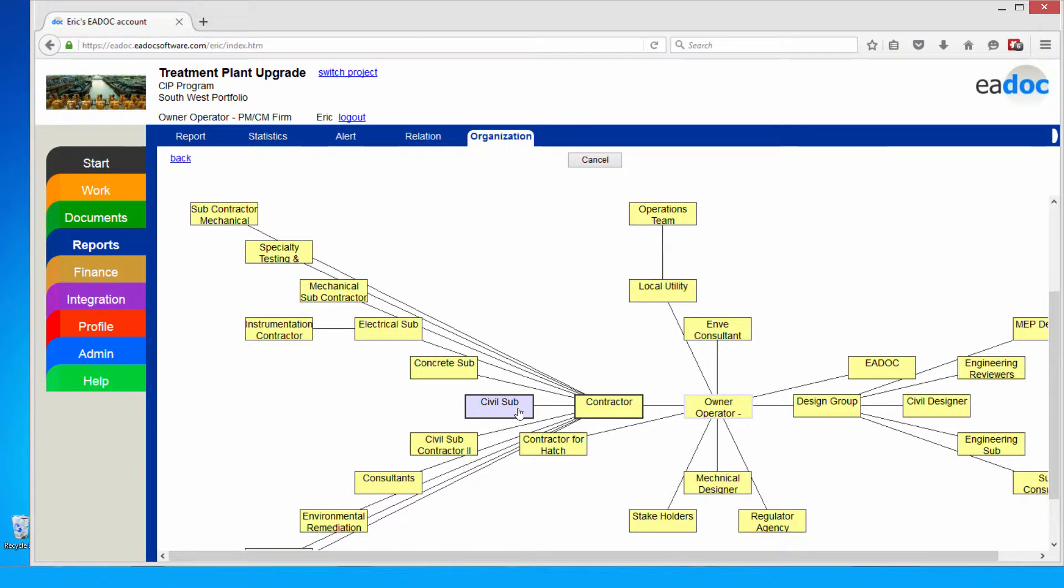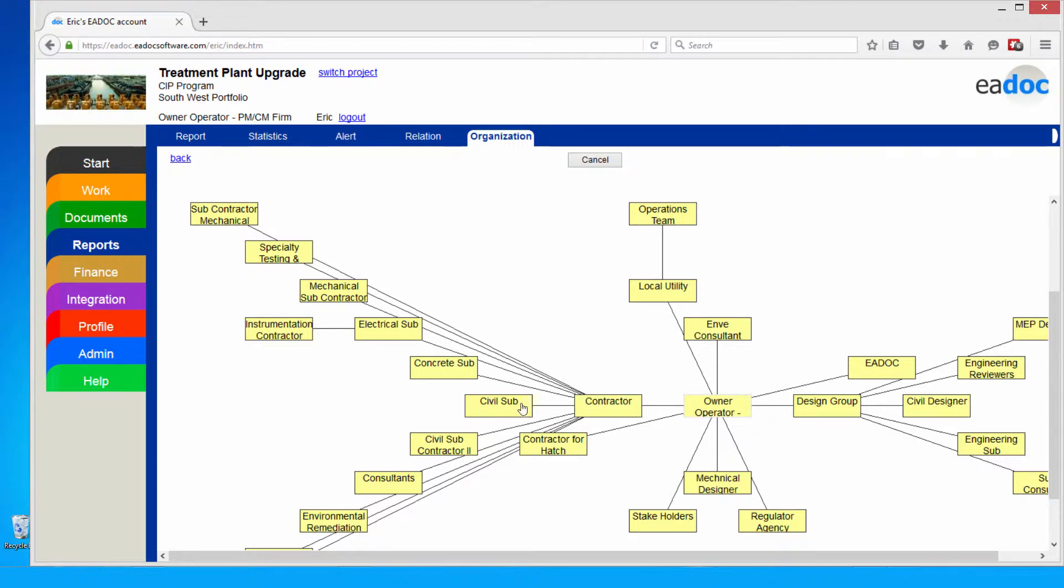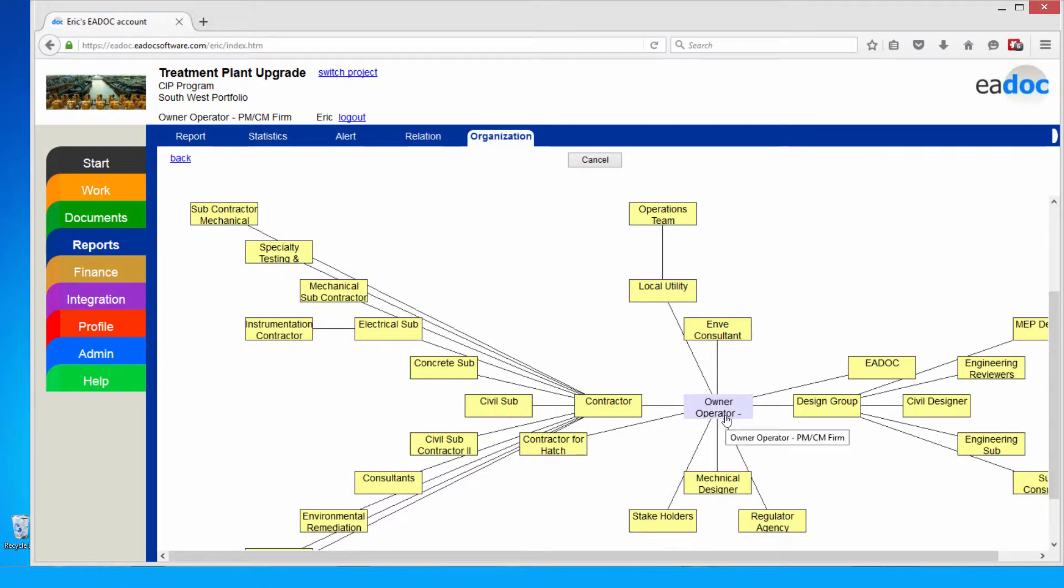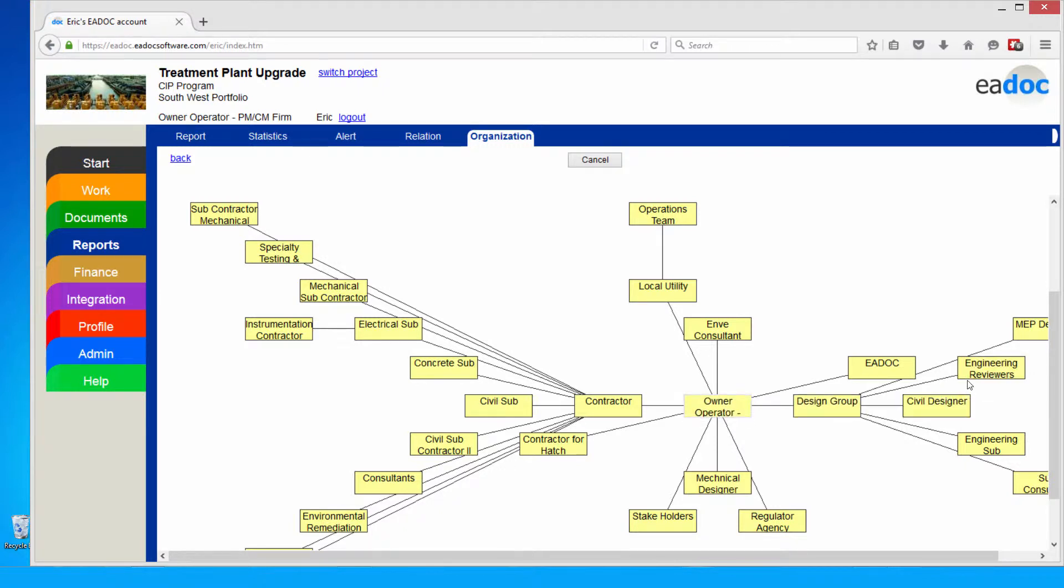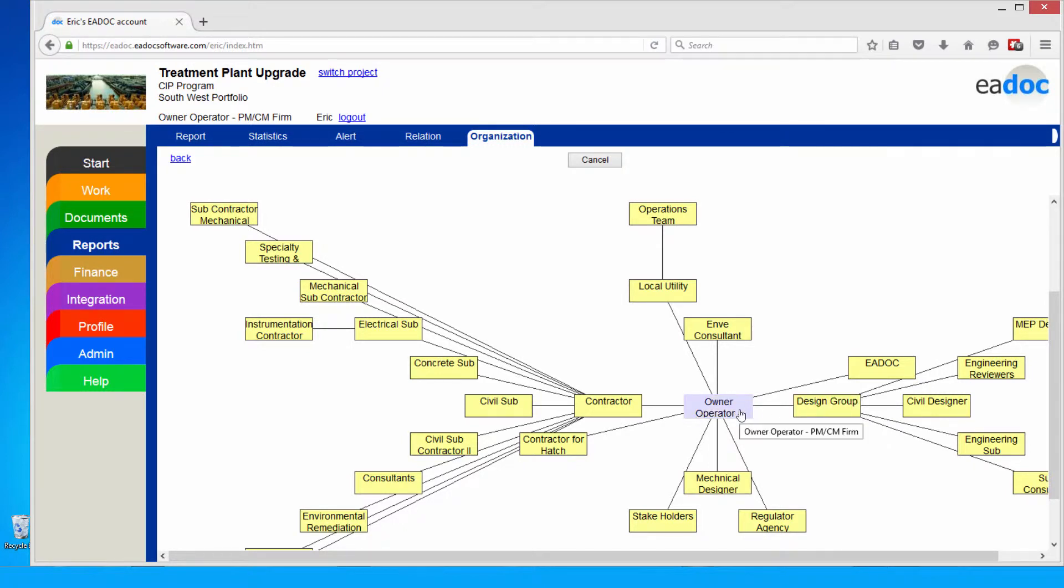With the application, each project participant has full control. For example, if my civil subcontractor fills out an RFI and turns it into my prime, they can review it, and if it's incomplete or inaccurate, they can return it back to the civil sub. If that RFI is ready to go, they can pass it on to myself here at the owner-operator. I can write it to my designers, and then they can send it out to the subs or whoever needs to go for review. Not only do they control that initial request, the RFI, but they can also control the responses. My subconsultants, I could capture multiple RFI comments, merge them together here as the prime designer, and then send a final response back to my client.